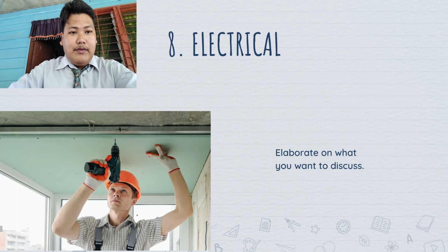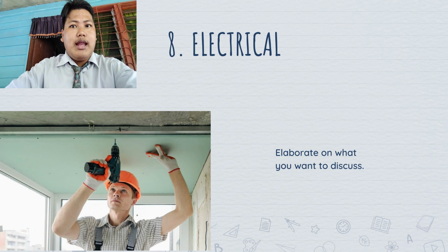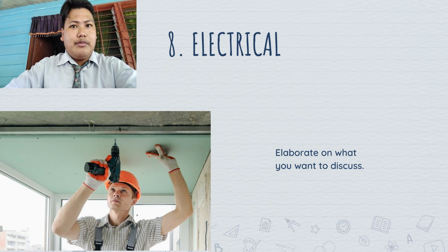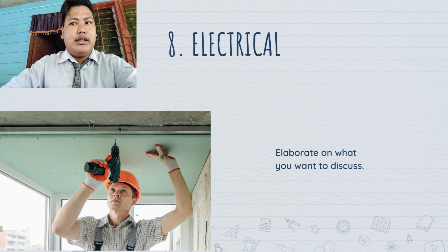The eighth activity during the construction project is electrical. Individual electricians on a construction project are responsible for ensuring that the structure will ultimately have full access to electricity from the transformer provided by the electrical company, which is located close to the building. There are several steps that go into the installation of electricity in a building, including temporary electrical needs, rough installation, and finally the real installation which will be used.